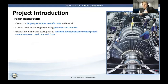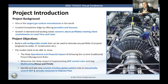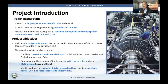Another thing worrying the team was that they kept quoting the same lead times based on their catalogue for this type of gas turbine, but in the meantime a backlog had been developing, and they realized they weren't considering the backlog when making these commitments. So were they going to be able to deliver this project on time? What we worked with our partners to say was: this is an ideal opportunity where building a dynamic simulation model — a digital twin of this environment — could be extremely useful, because we could answer those questions directly, not just the operational impact but also the financial impact of these delays and defects they've had so far.